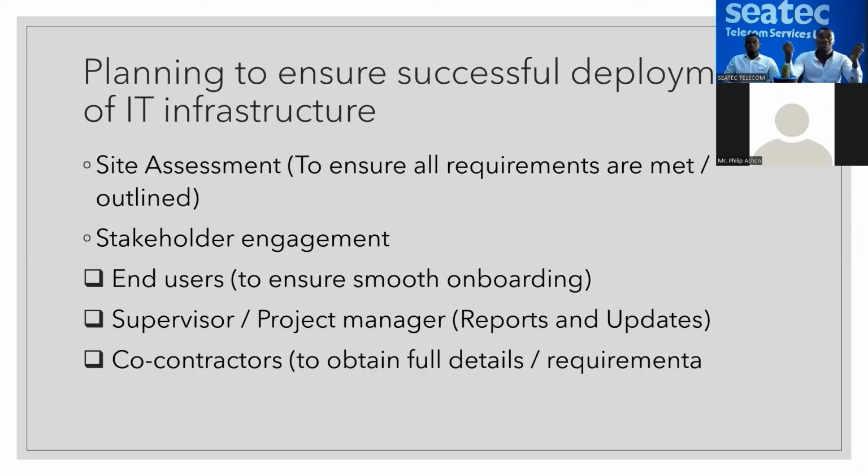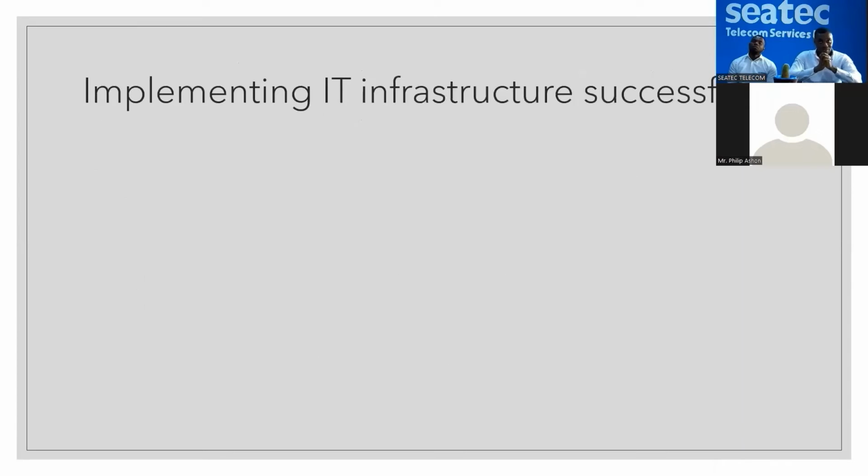In my opinion, you should even get their drawings, get their plan. Find a way to handshake your solution with this so that you don't end up encountering the example I just gave where somebody is running a pipe where you also plan to run a pipe. So this is for planning. Now for actual implementation, when you've planned, you've done your comprehensive plan, taking into consideration all the things I mentioned before, you come to implement. You now move to actual zooming into the deployment.